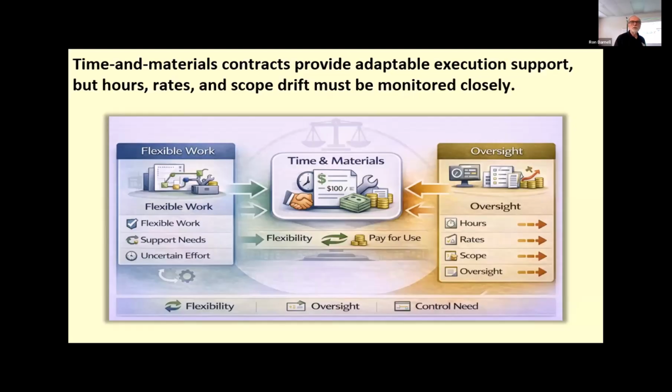So the cost to the project is probably going to be $400 or $500 per hour for a highly skilled person. So you have to factor that in. And one of the things you think of is, well, can we hire these people directly? So that's some of the decision you have to make here. But it makes the contract more adaptable than fixed price because the work can continue even when the total effort is not fully known in advance.